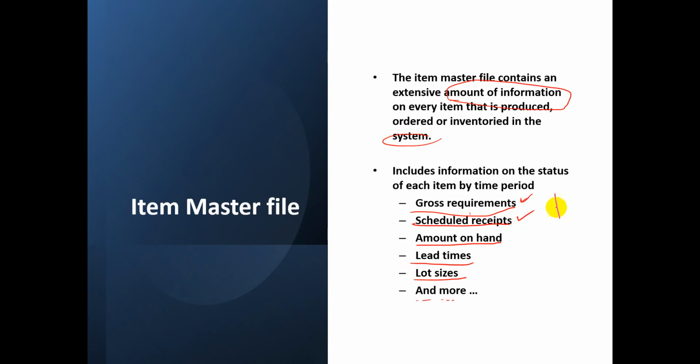Like, material will be received in-house, but the material will not get invoiced until it has gone through quality check and acceptance, and then invoicing. As per the commercial part, invoicing means whether the material received is done or not, they verify by the accounts and finance team, then they will post it in the warehouse. Okay, unless that is done, the factory cannot use this material without completion of this quality check and invoicing.